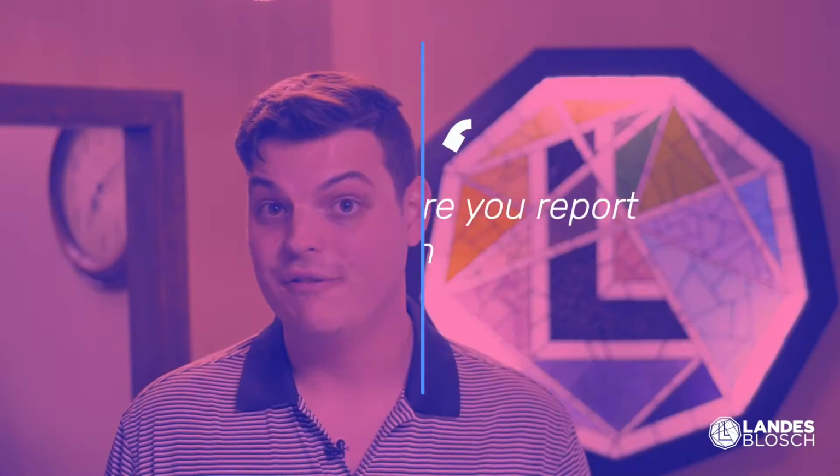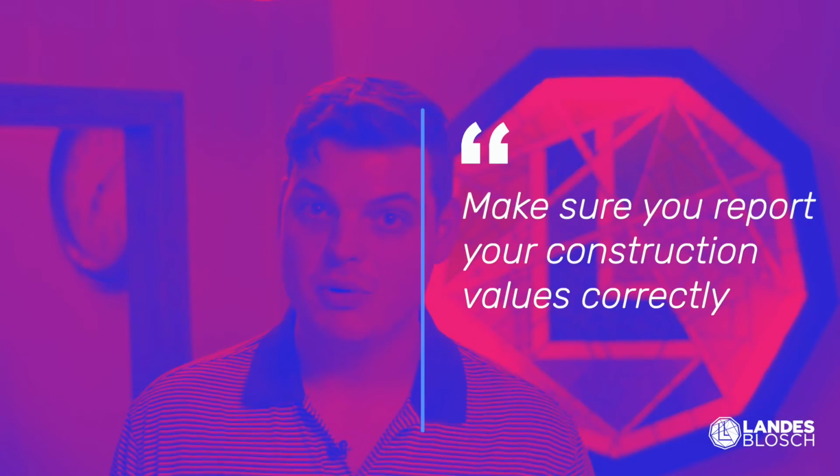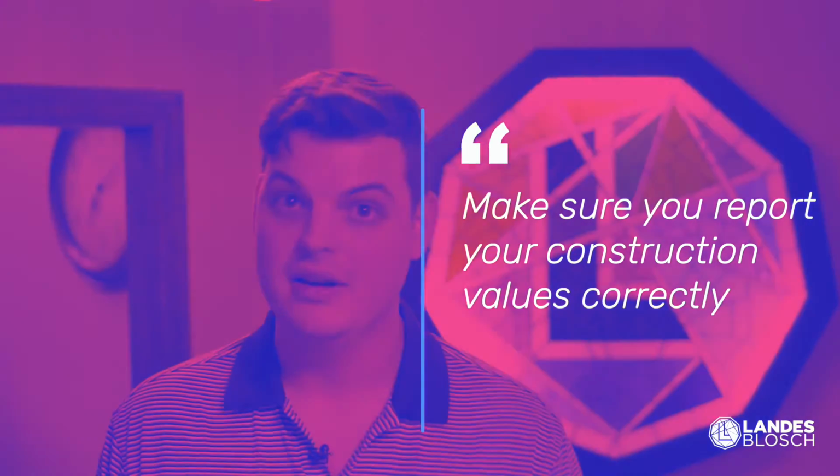And finally, our 4th tip is to make sure you report your construction values accurately. There is a 100% coinsurance clause included on the majority of builder's risk policies. And this means that there's no margin of error when accounting for your construction costs and the limit of insurance on your builder's risk insurance policy. Meaning that the amount that you're underinsured during the time of loss turns into the percentage of that claim that you have to pay out of pocket.